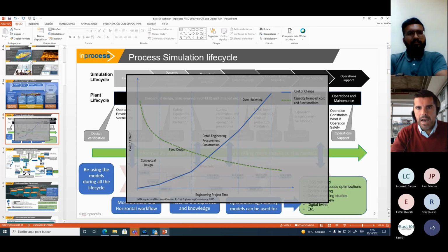Have we previously spent some time modeling and performing a specific dynamic simulation analysis for some critical packages, or are we starting to create an integrated model of a facility? As an average, when we are talking about an FPSO, maybe we are talking about 4 to 5 months to get the complete dynamic model of the whole topside facility.